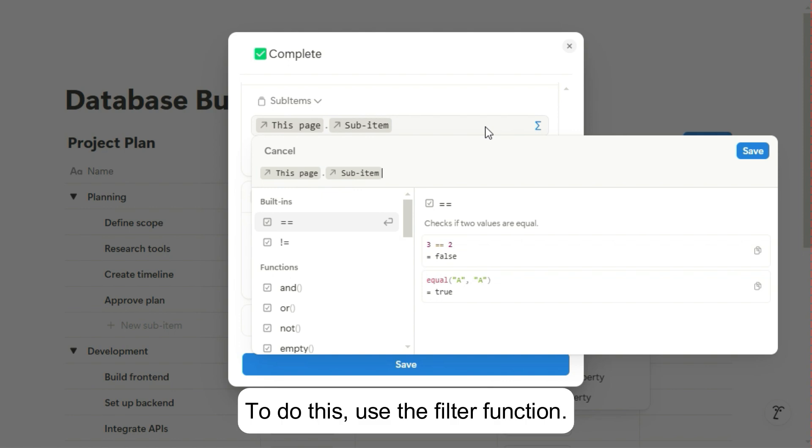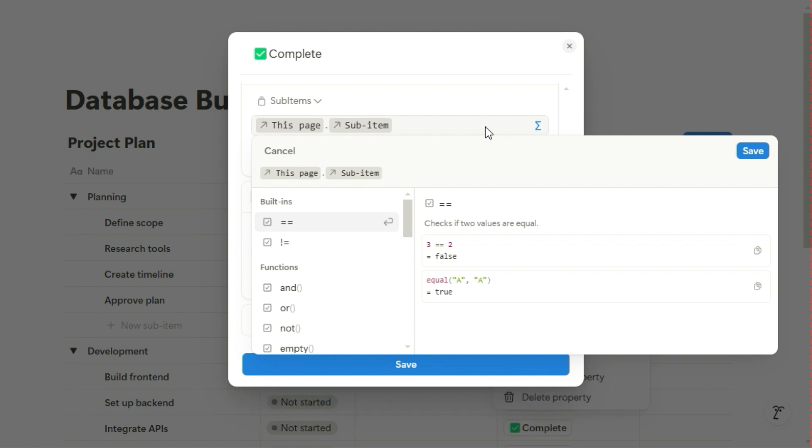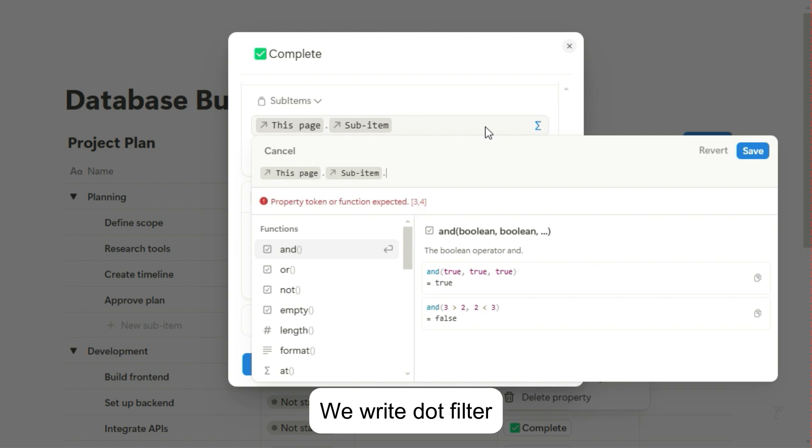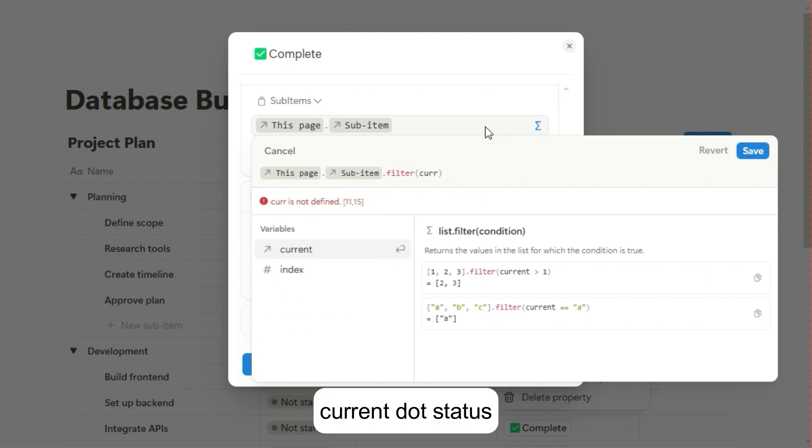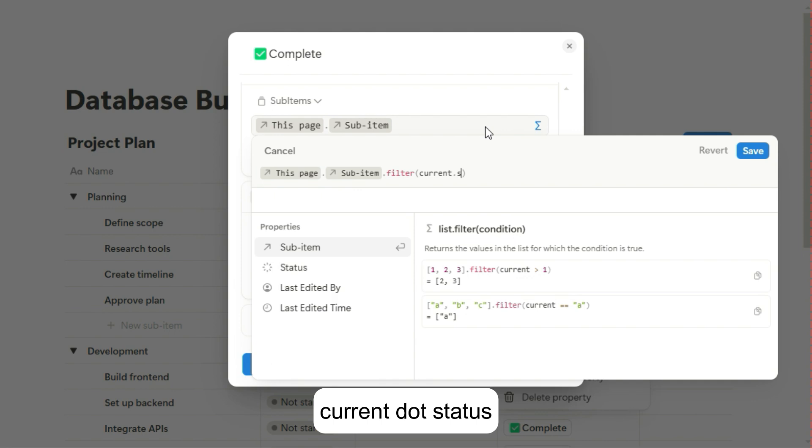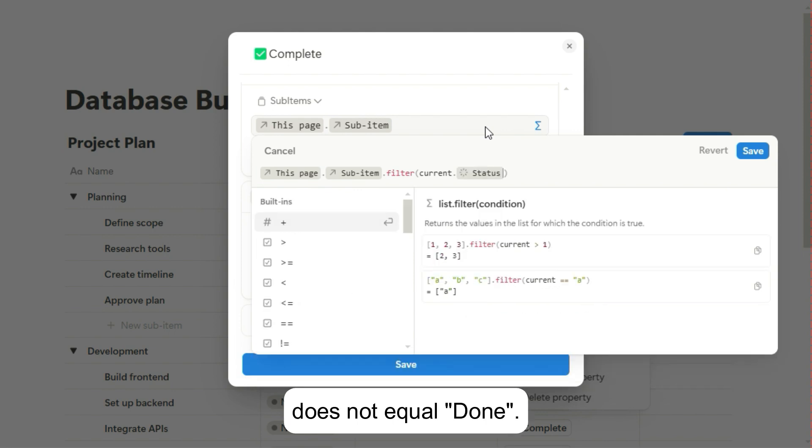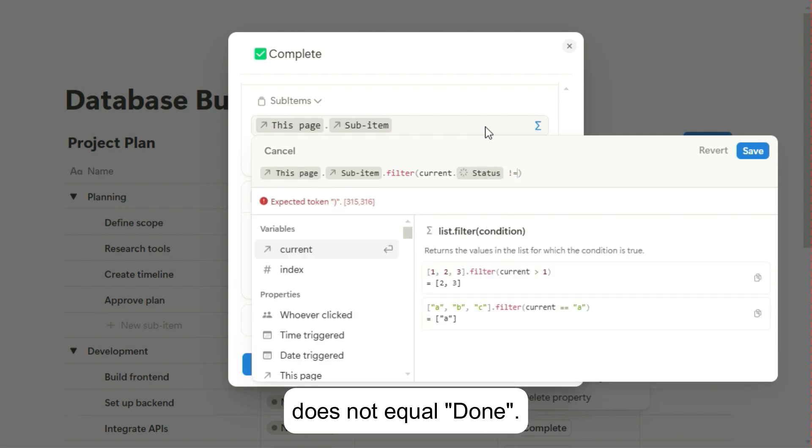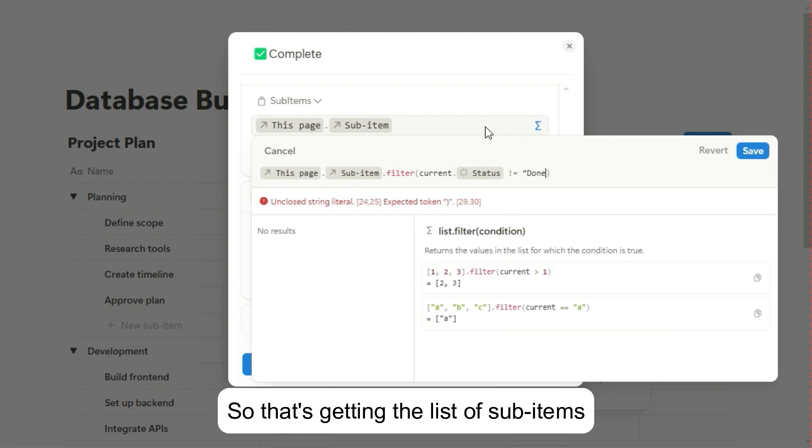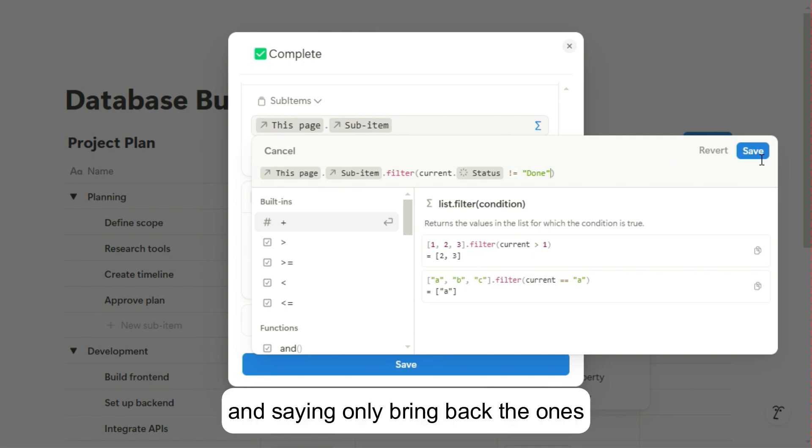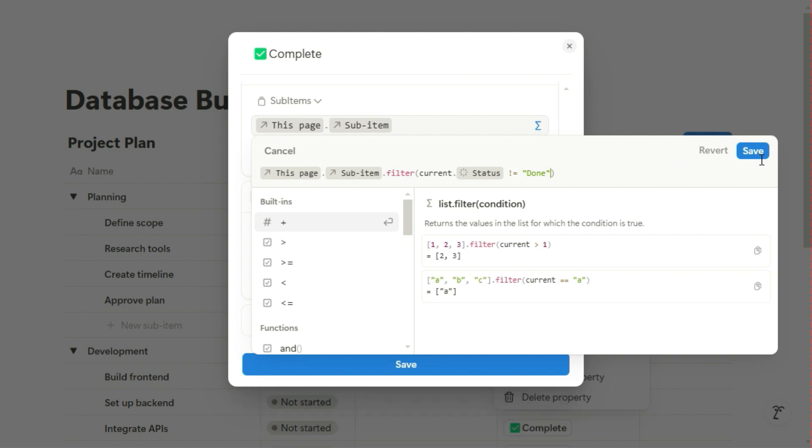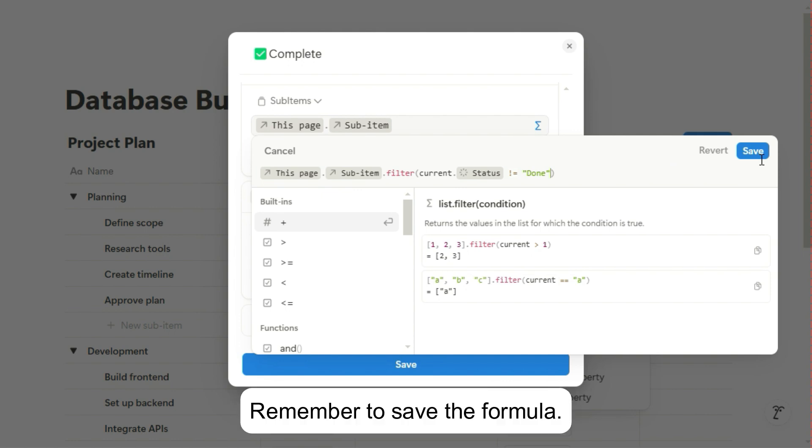To do this, use the filter function. We write .filter current.status does not equal Done. So that's getting the list of sub-items and saying only bring back the ones that don't have a status of Done. Remember to save the formula.